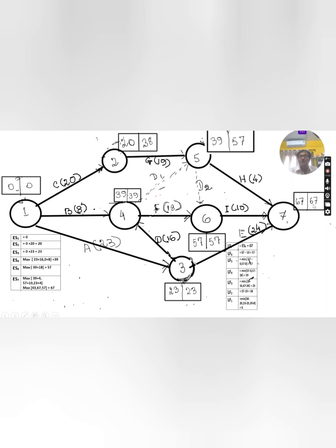That is the highest time allocated for the project in this way. Now come to the next point, fifth node. How many activities are coming out from this? 1 and 2, two activities. In this case, you have to consider the minimum value. Previously you had to select the highest one, but in this case you have to select the minimum one, because after that, the required time for the remaining activities is needed to complete the project. That's why the minimum time will take two activities.